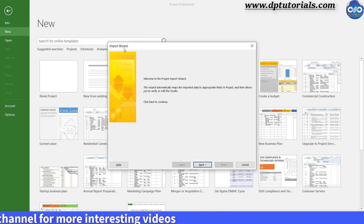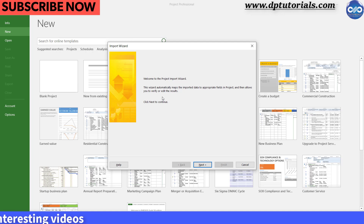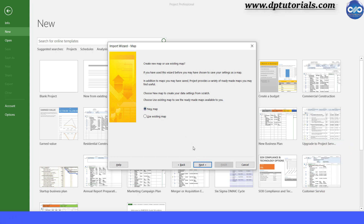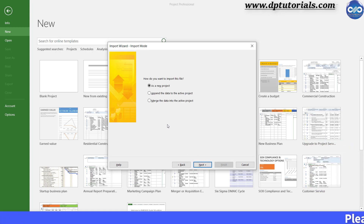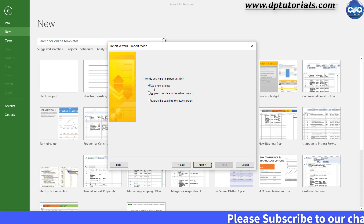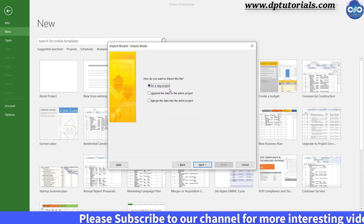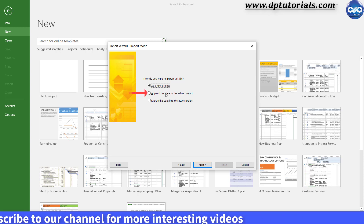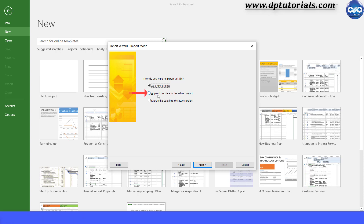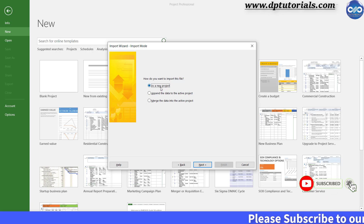The Import Wizard opens up, which will help us import step by step. Click Next. With New Map selected, click Next. Here in import mode, you have three options. As we are creating a fresh project, we will select the first option: New Project. If you want to append activities, select the Append option where Excel activities will be added to the bottom of your existing schedule. If you select the third option to merge, your complete project schedule gets updated. Select the first option and click Next.